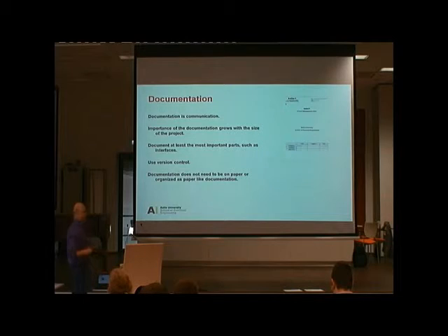And as soon as you start to fiddle with documentation, you realize that you need some kind of version control. So who has been writing in my document? What is this 3 here? Is it a real number or not? So if you have version control, you can check. And maybe even, if you have proper version control, nobody other than your system engineer is able to change this number. So you know that this is coming from a system engineer and this is for real.